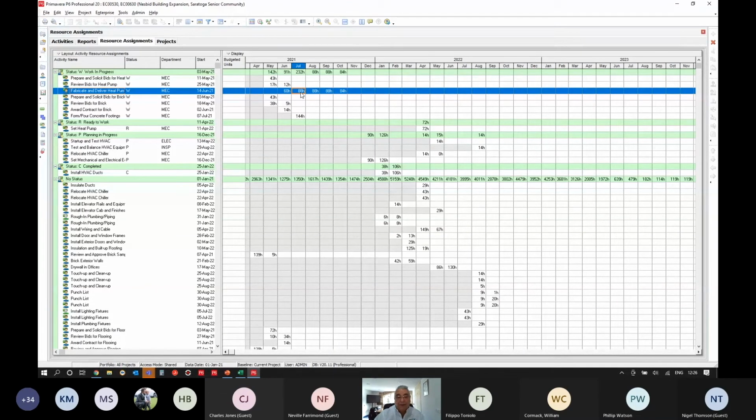So I can say, actually, I'm working 60 hours here, and it would recalculate the spread accordingly. But the feature we've now got is, if I wanted to say, actually, we're working 60 hours from June through to October, I just highlight a bunch of cells like this and then hit the right mouse button, and you'll now see you've got a nice new feature called Fill Across.